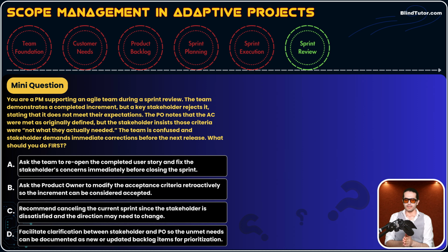Guys, as I told you before, Agile has some disciplines, okay? Reopening a closed and done thing violates that discipline. Extending, for example, sprint length violates that discipline. Exceeding that 15-minute daily stand-up violates that discipline, okay?